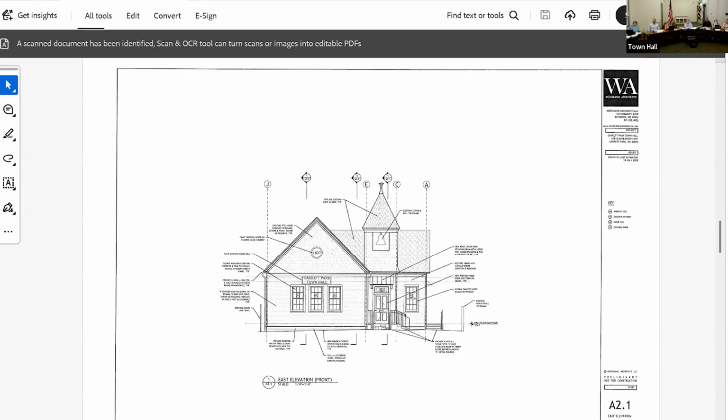So all the shingle and the trim will be original. The siding we're pricing as replacement. This board at the bottom is going to be PVC. We got permission from the HVC because it's so close to the grade. We're sealing openings that are allowing moisture and moist air to get in underneath, and we're sealing the crossways. The ramp is going to be redone and shortened.